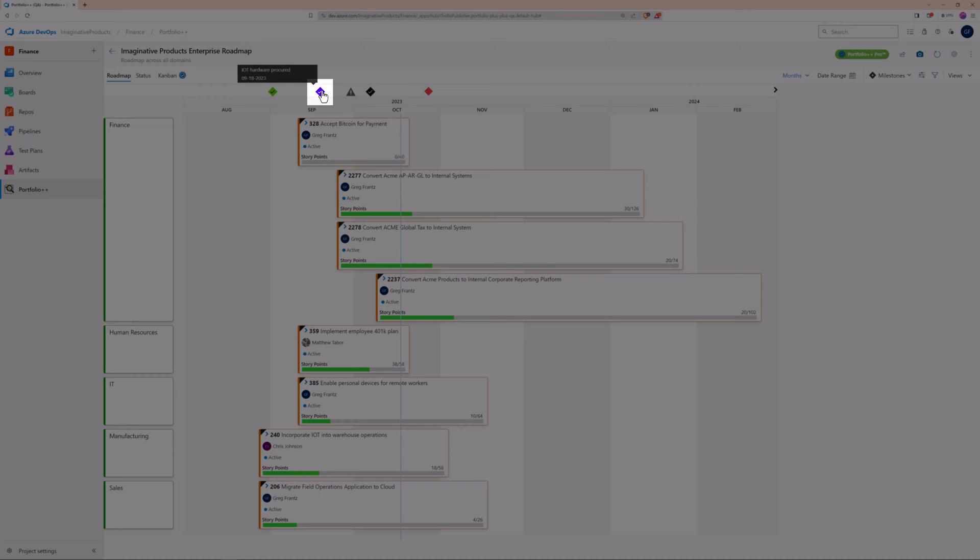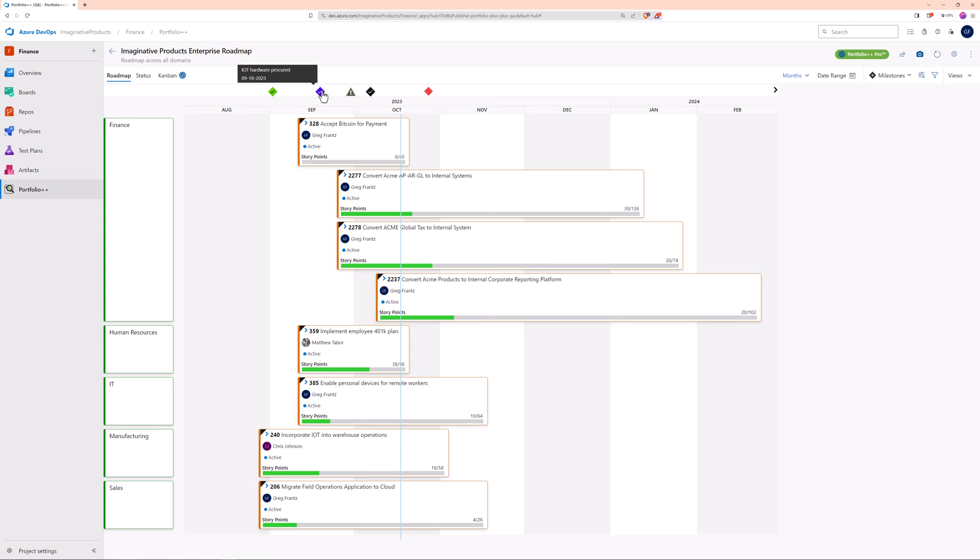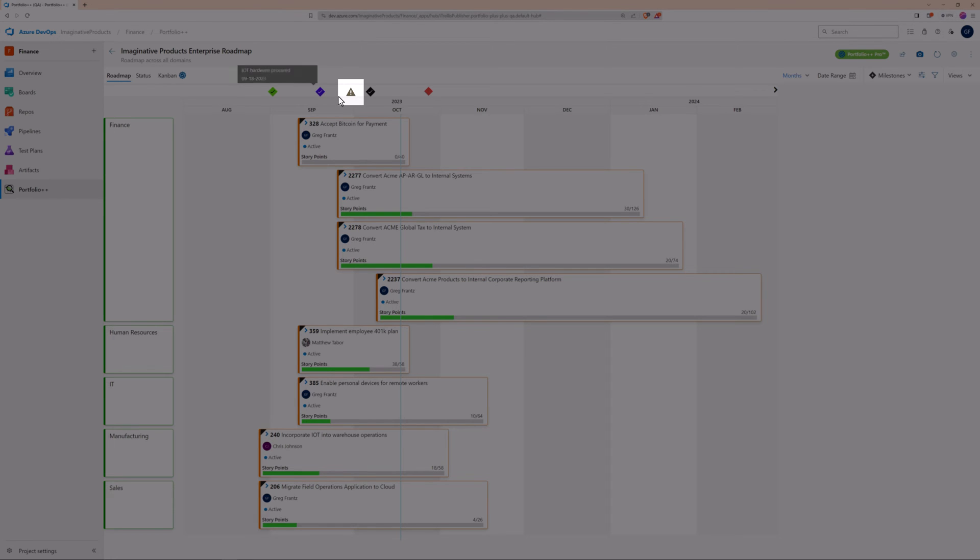However, if the date of a milestone is passed and the work item isn't completed, it shows the milestone in jeopardy with a triangle and exclamation mark. This feature is useful for tracking critical path work items.